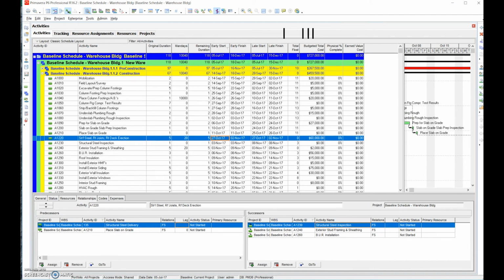So in conclusion, we've done a final review. We've gone through step 1 through 15 up to this point, and now we've gone through and we're looking at the schedule to make sure it makes logical sense for every individual step. Make sure that the logic makes sense. Make sure that the total float is still 0. Make sure we have the right start date, the right end date. We want to have a cascading effect from left to right. And we understand that logic is extremely important within a project schedule. So that's step number 16.